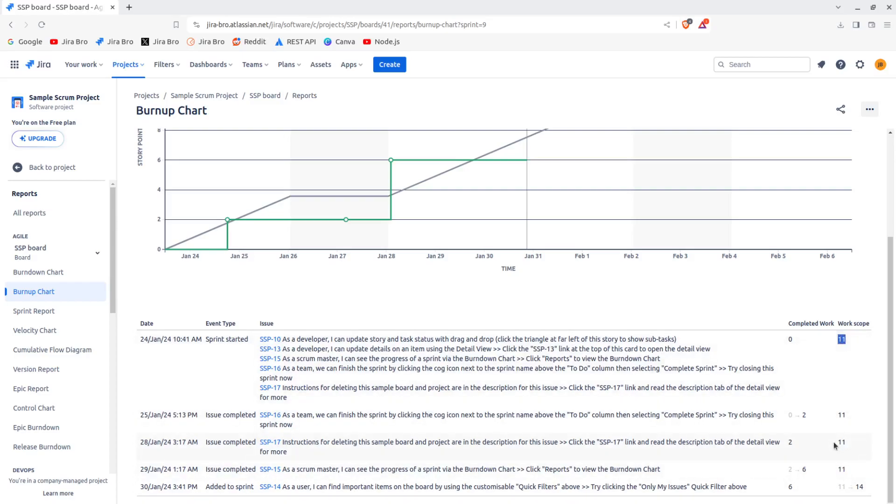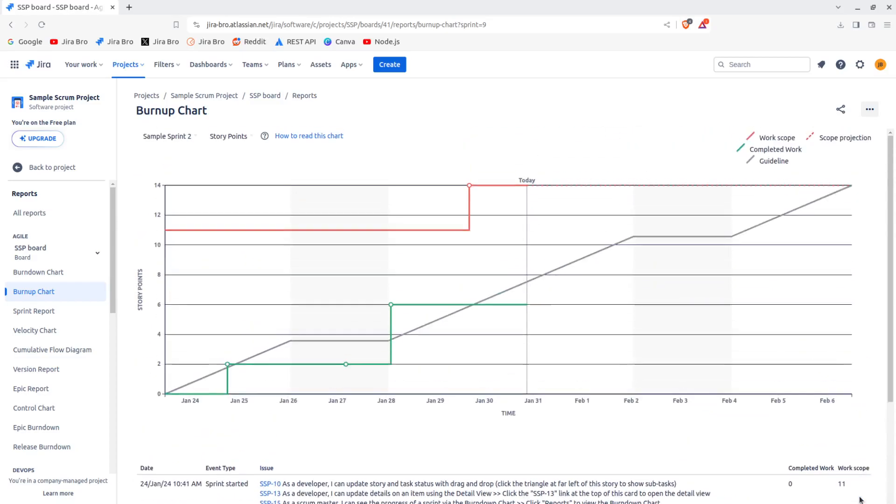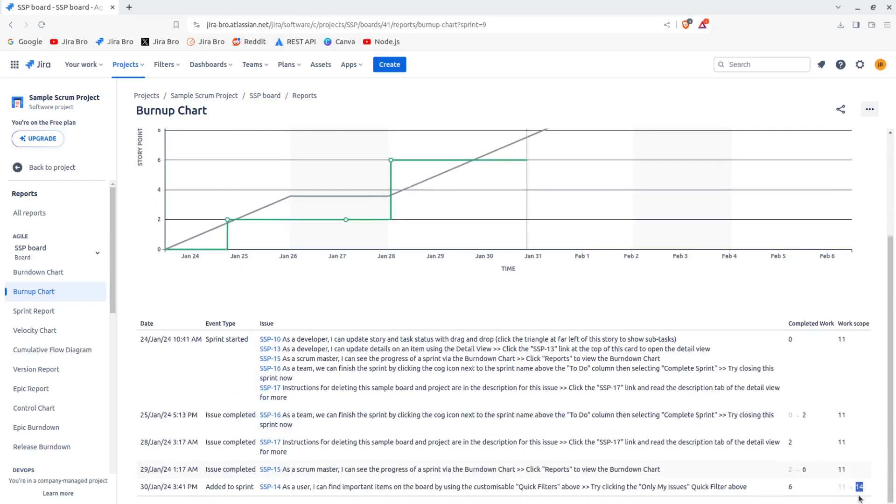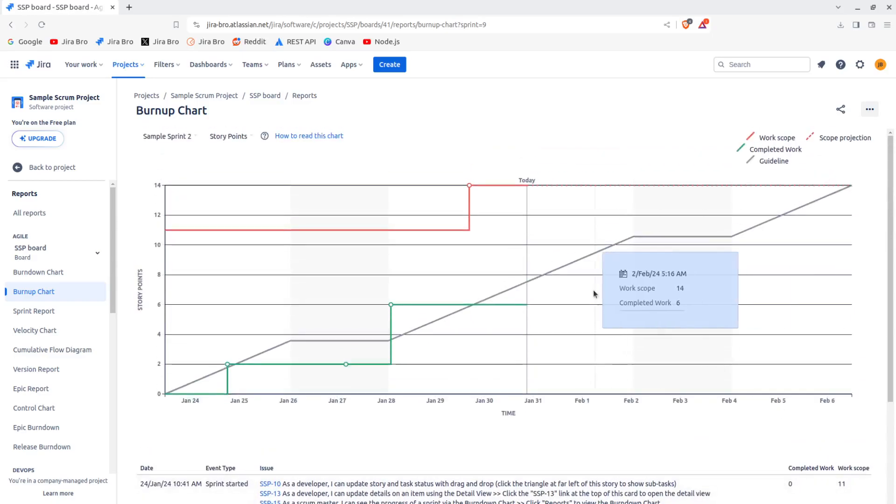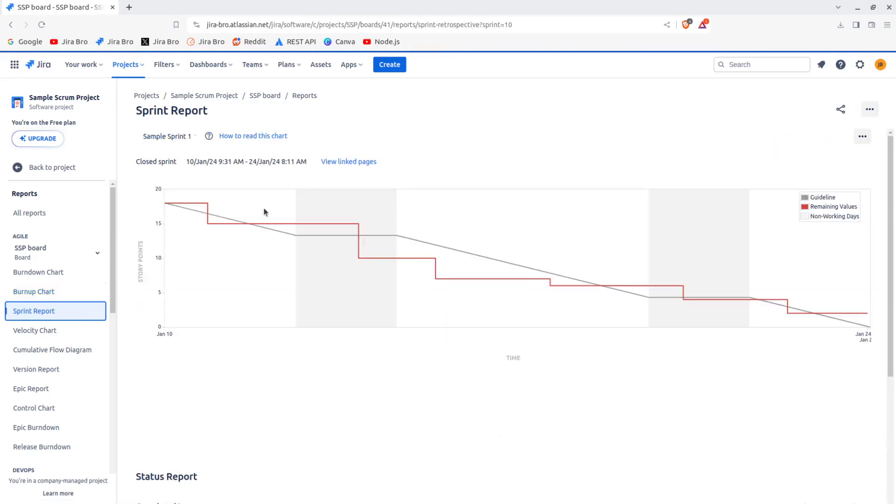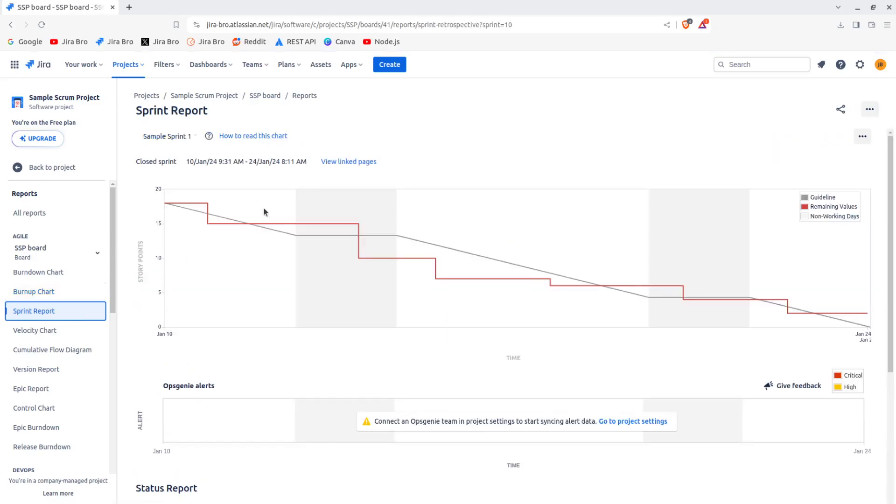What we have is going to be added to the sprint, and now work scope. So it was like 11, 11, and now it's like 14 because an issue has been added to the sprint. This leads to more story points for the sprint to complete, which is not a really good practice because you don't want to have scope creep. It's a bad thing.